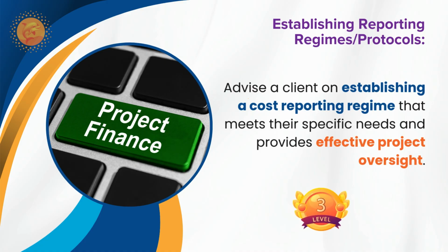Yes, you have to explain these things. Whenever we are providing some format, that format should be understandable to the client, and it should be some sort of dashboard, easily bringing every detail into one single A3 sheet or some desktop mechanism. So it should be easily understandable by the client. That is the first format, and then we can include some sort of KPIs like cost performance, cost to complete, those kinds of things.